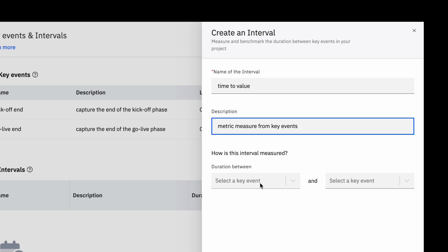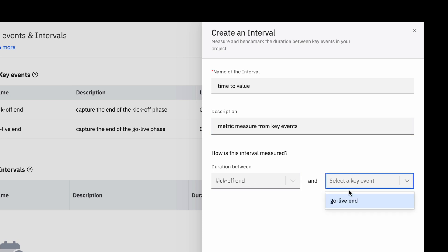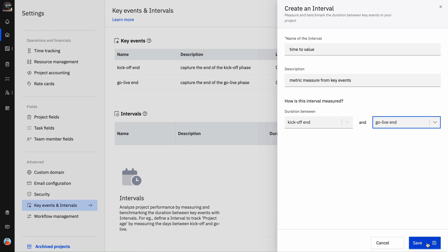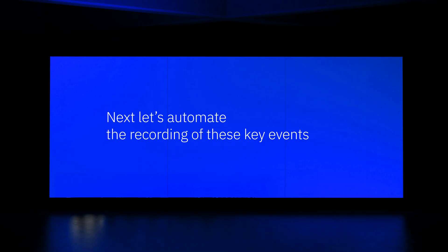Select the two key events between which the duration needs to be measured. As per our example, the interval between Kickoff End and Go Live End key events can be measured. Click Save. Repeat the same steps to add as many intervals as necessary.